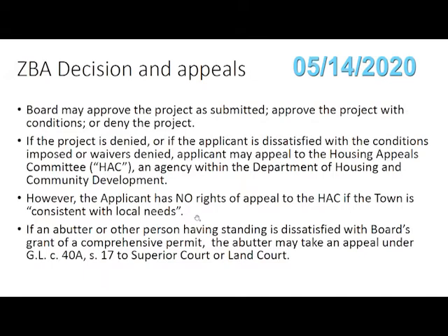When the abutter appeals and the developer appeals the same Board of Appeals decision, they go to different places, and the abutter's appeal gets stayed, frozen, until the developer's appeal is litigated and resolved. And again, that can take many, many years. We've seen cases sometimes be 8 or 9 or 10 years throughout this elongated process.